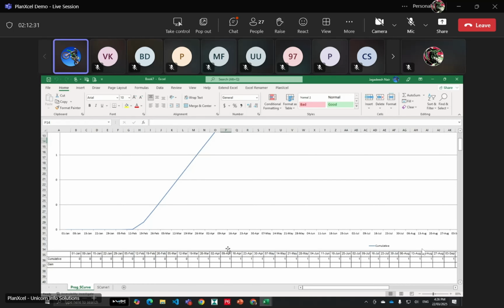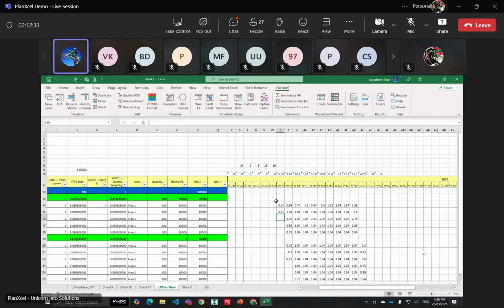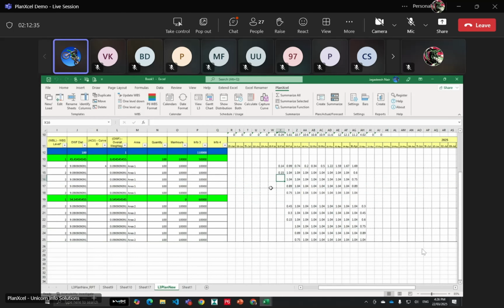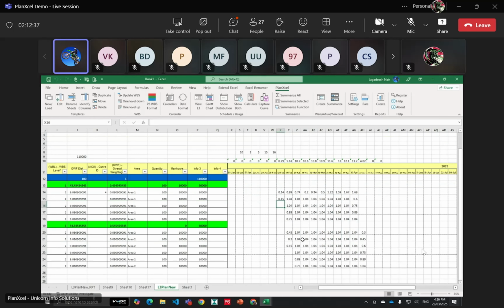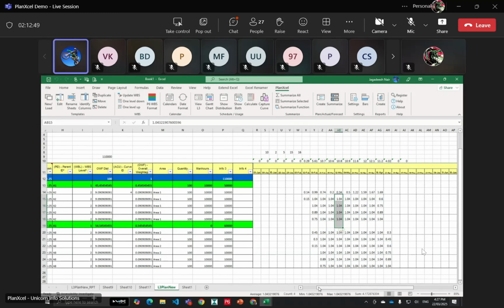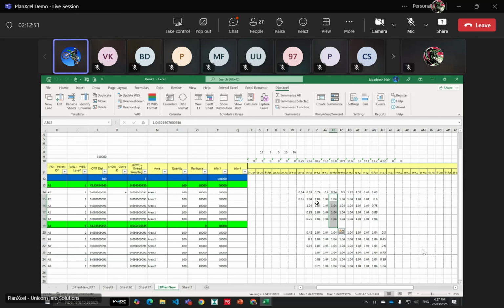In summary, this is how we are going to dissect the requirements, which will match with what is coming out from the S-curve. So if you want to see what is the 10.8 requirement coming in, then we can see from where, which activity it is happening. And this is how we will come to know whether we should have a rescheduling on any particular activity in order to reduce the gain, to have a smooth curve or things like this.